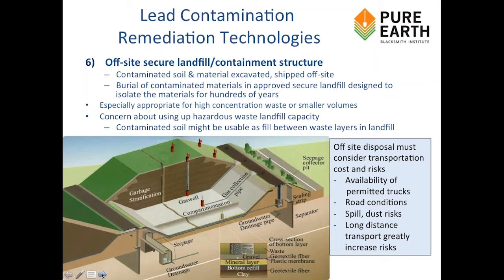We've found that first of all, it's what governments want to do very often on their first impression. Let's just take all this stuff away and put it in a landfill. Then they find out the cost for that, and it's determined that it's really too expensive for low contaminated waste. So if you're in the 1,000, 2,000, 4,000 milligram per kilogram range of lead contamination in soil, it's just too expensive to do this for large volumes of lower contaminated waste.